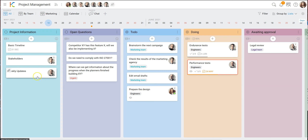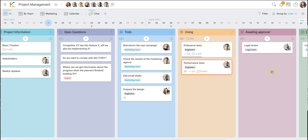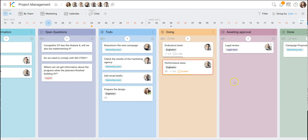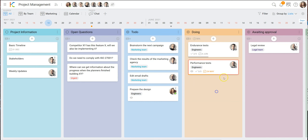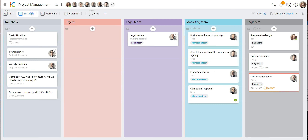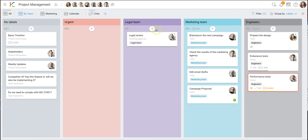We make this distinction because things that are information cannot be late, for example, and there will be no reminders, because these things do not represent work — they're just information. Everything in a list that has an icon will be interpreted by KanBo as work. So we have created a view called 'by team' where we are grouping by label, so you can easily see which team has how much load.